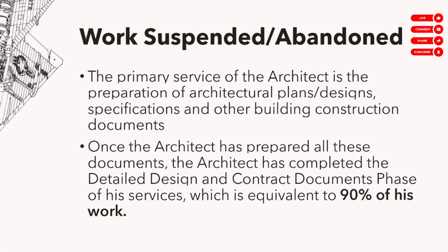So old standards, the UAP document 202, that figure, 90% down, it used to be 85%. Okay, it used to be 85%. But FYI, in the newer standards, it's 90%. So pag natapos mo yung contract documents, you should collect 90% of the fee.